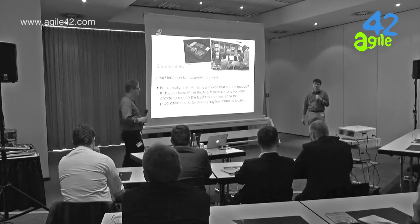More expensive than actually going to China? And how many demo boards will you develop during the development cycle of a product? How many are you going to throw away, if any? Is that cost really so heavy on the development? This is the challenge you have to face yourself and make a trade-off decision on, because in my opinion it's definitely very stupid to develop hardware in Taiwan or in China in the course of the software development, where you're still developing the product as well. Because the money you saved at the expense of having 6 weeks or more of delay time is not worth it.